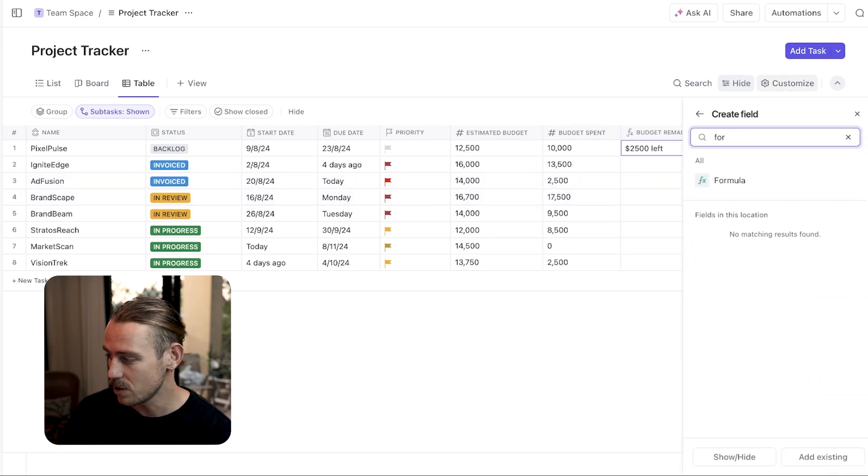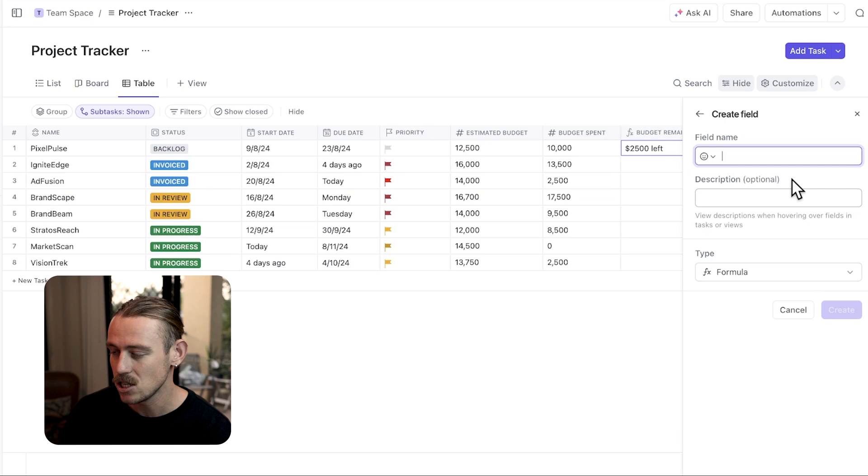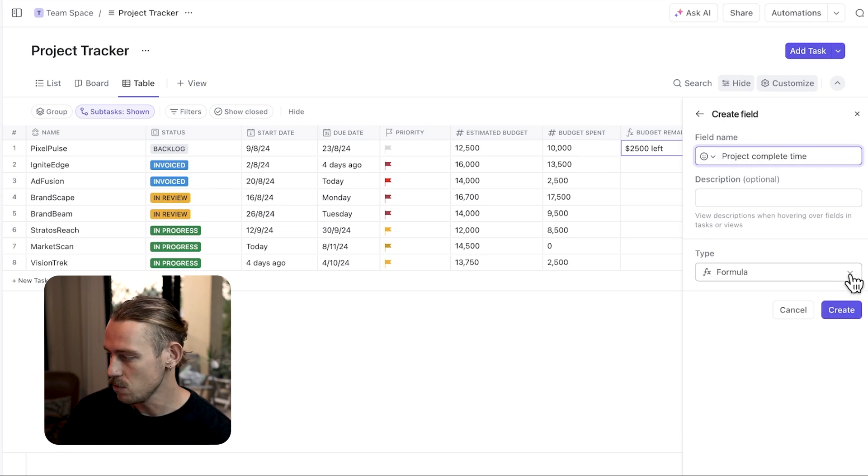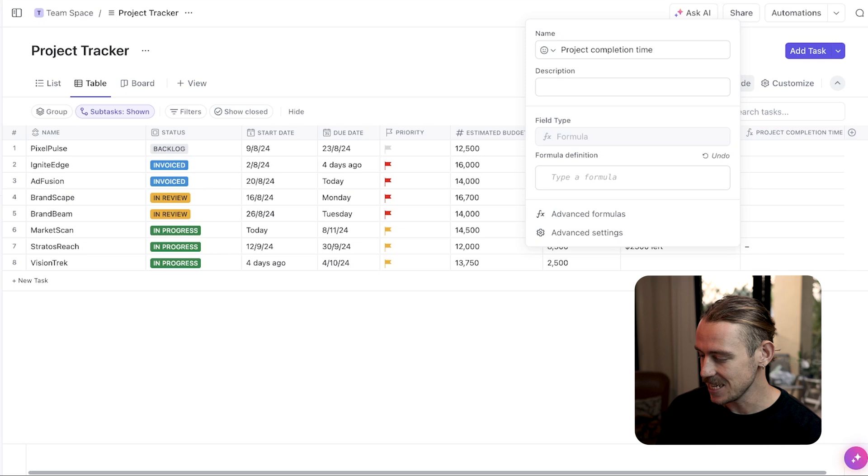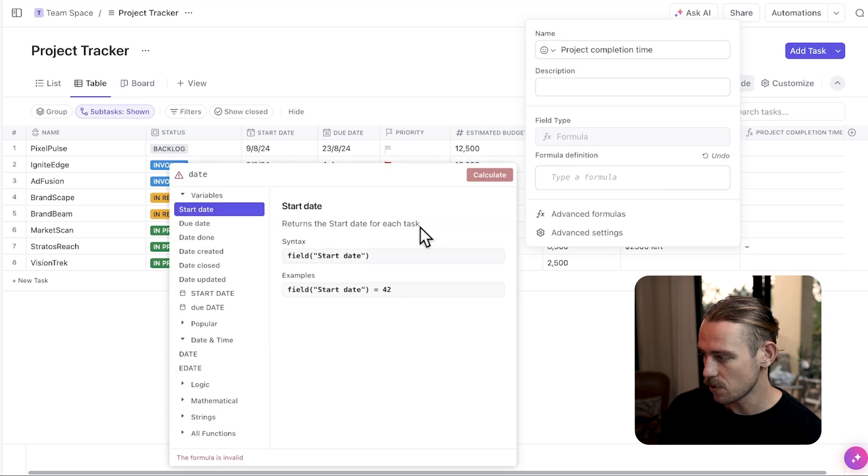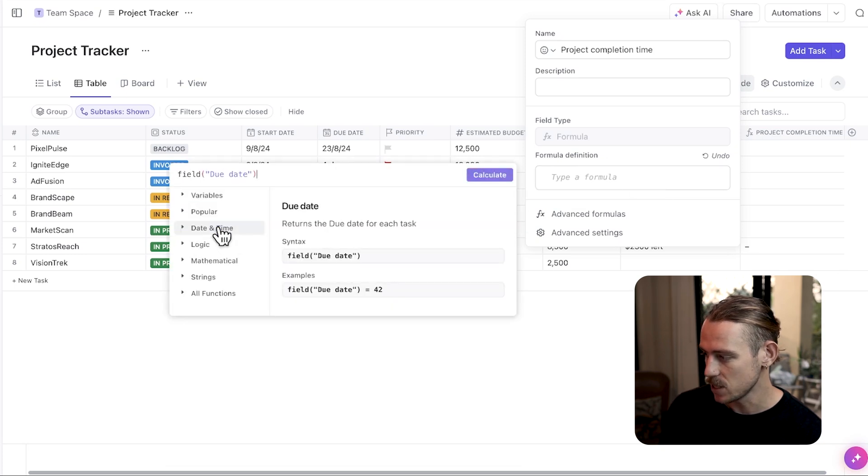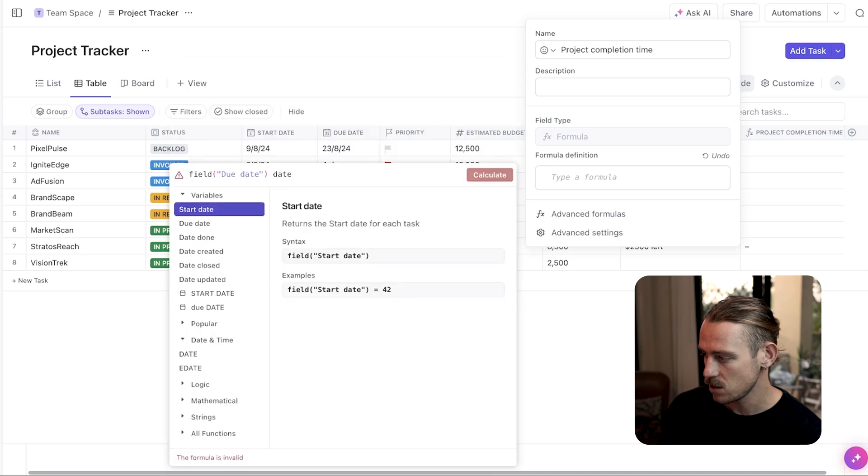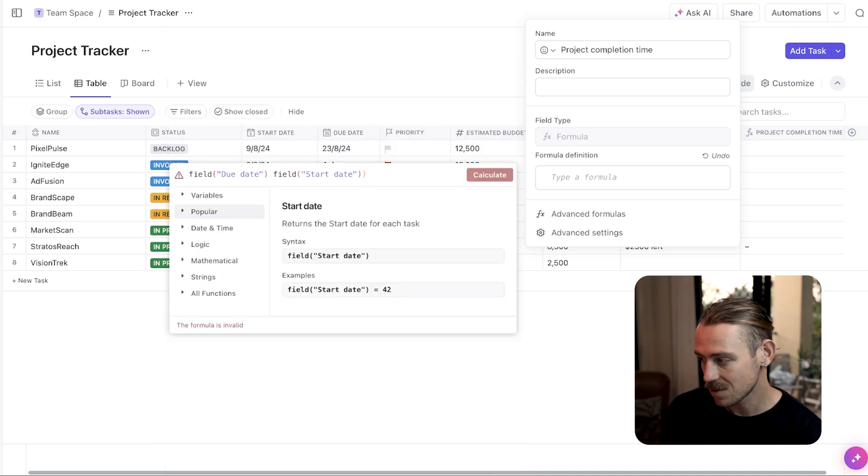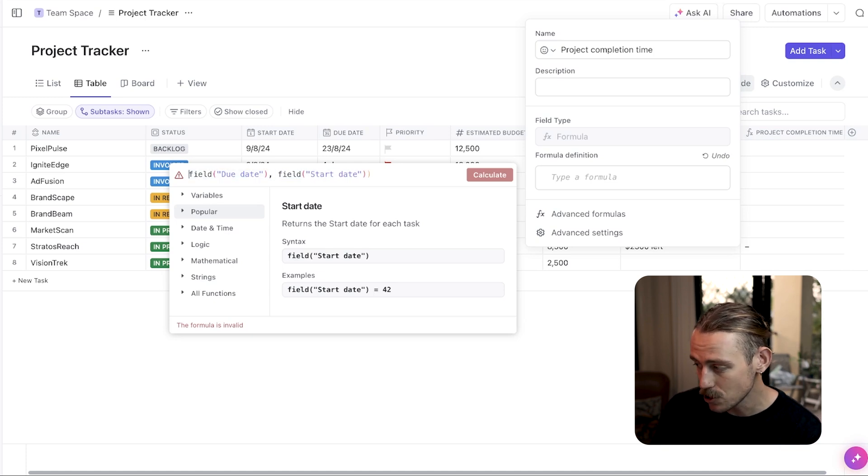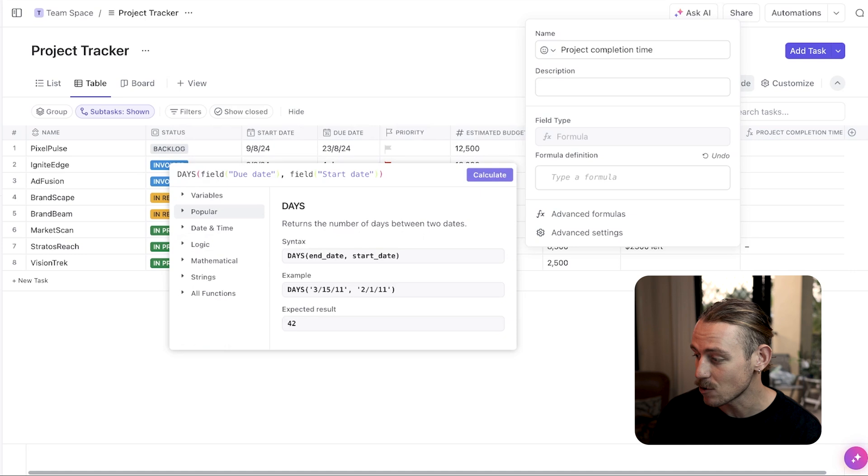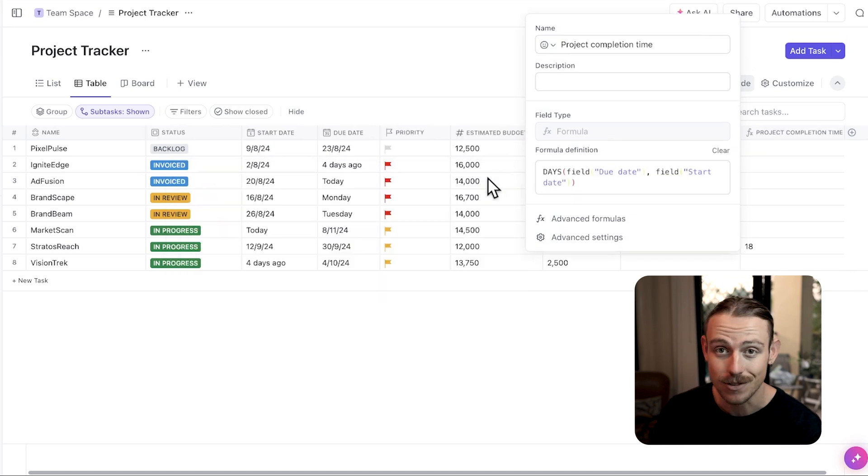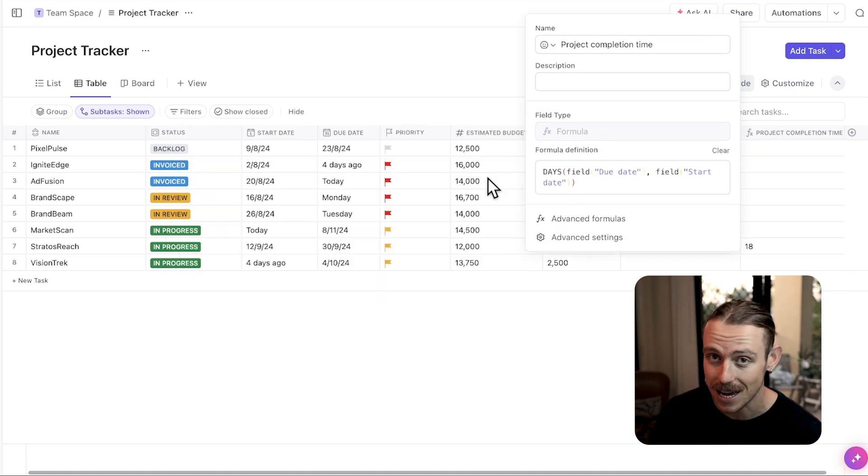Let's create another one quickly. I need to find a project completion time. So, using the date div function to find the number of days between the start date of the project and the end date. This is the formula here. This calculates how long it took to complete the project and could be used in a summary of the project created using ClickUp's dashboards.